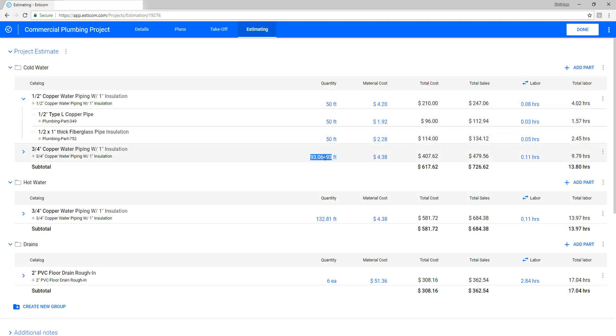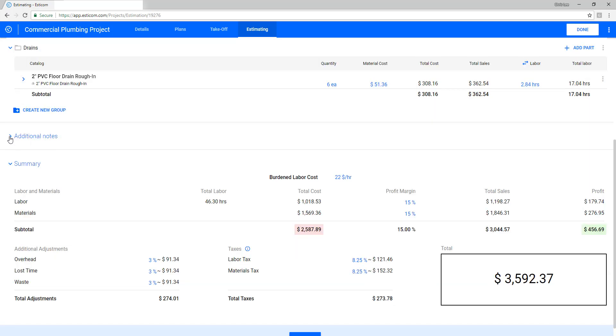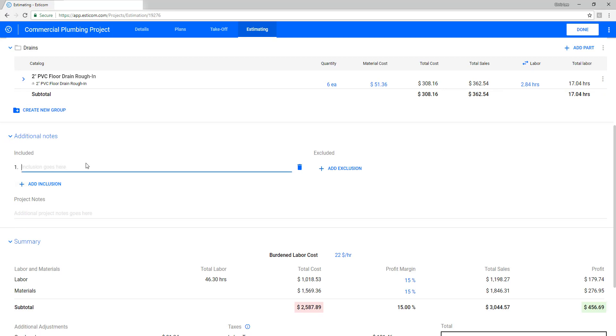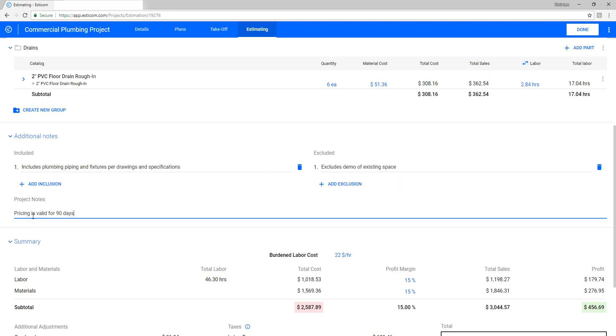In this example, I'll adjust the raw takeoffs by increasing the quantities to a nice round number. Next, let's add a couple inclusions and exclusions relevant to the project and a note saying how long the pricing is valid.